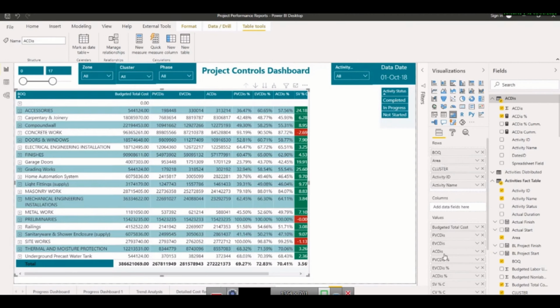For example, if you are booking the man hours against each element, column, raft, you need to make these activity codes inside P6, and then you can bring the same Excel sheet here and connect them through activity code, so it will work. So that's how we are connecting these things here through P6. So actual cost percent is here, yes.